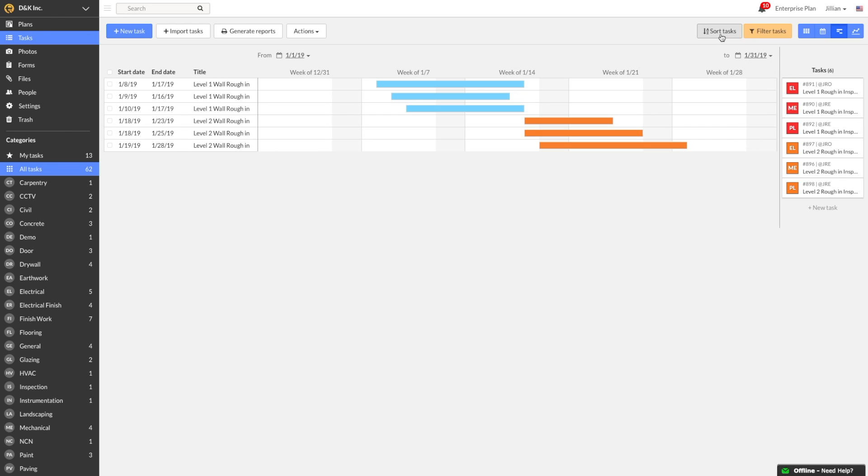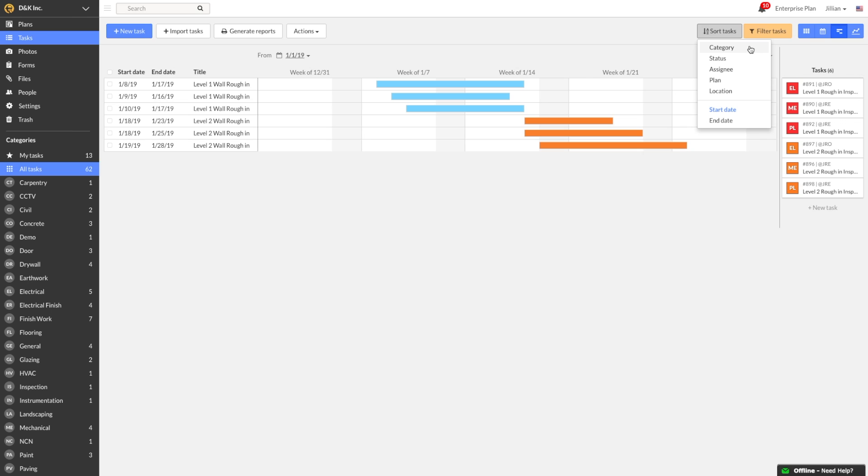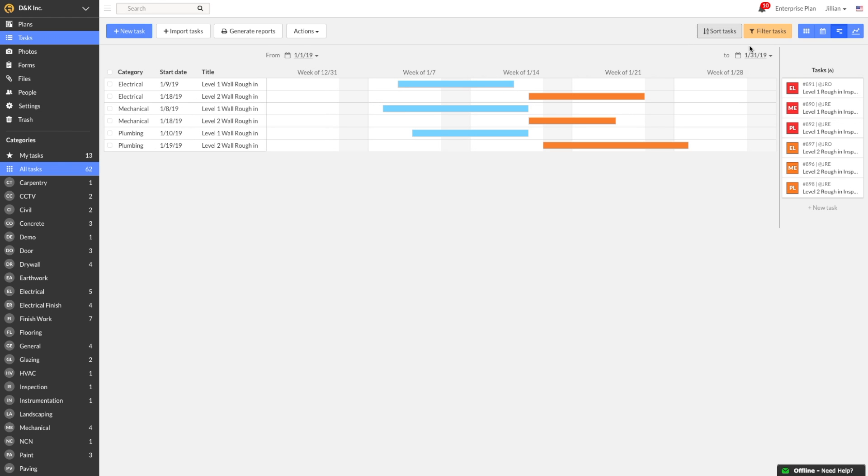You also are able to sort tasks by category, status, assignee, plan, and location. By default, the tasks will be sorted by start date and end date. Sorting by location helps you visualize the scheduled work in an area to make sure you don't have trades working on top of each other. And sorting by assignee or category gives you an understanding of the workload on a specific person or team.